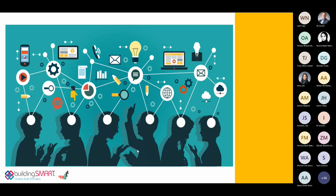A typical large construction project at its peak involves communication between approximately 90 organizations and over 600 individuals. Imagine this much information exchange reaching millions and millions of emails. At the center of those exchanges are usually approvals, requests for information, variations, and other critical decision points. If you miss one of those points, we are going to face a lot of problems during project execution.